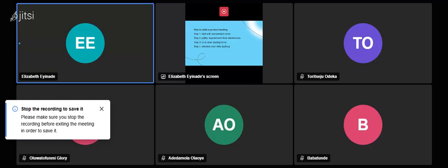When you've written all of them out, you can now go back to start prioritizing them in the order of importance, in the order of value that they give. You start prioritizing them: oh, okay, this one comes first, this comes second. Like you saw when we were looking at the Jira board, you can reorder. That you typed or placed an item first does not mean that item will remain first.